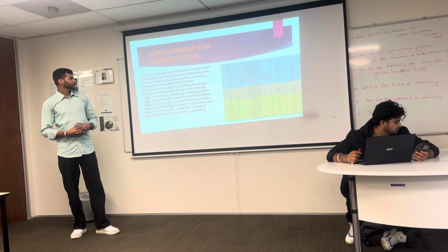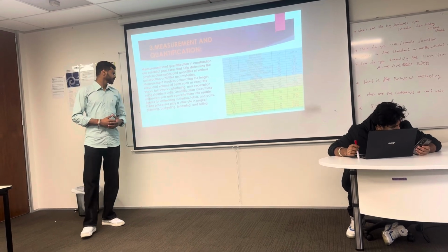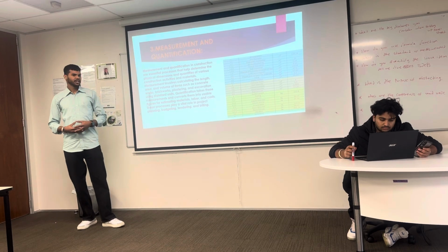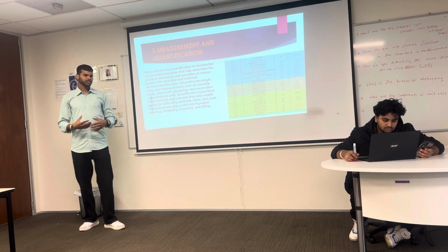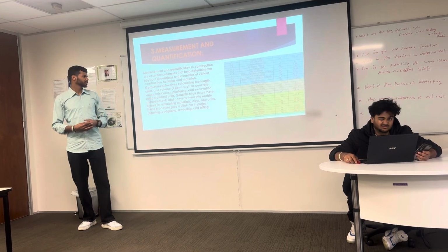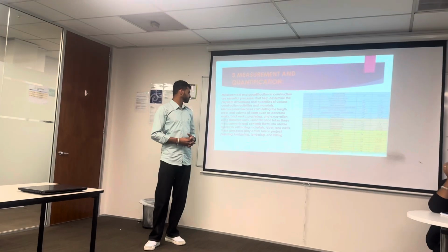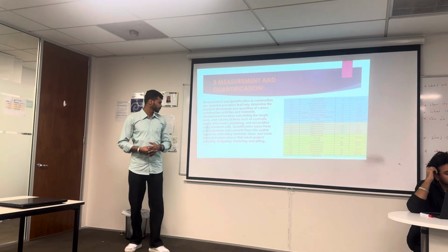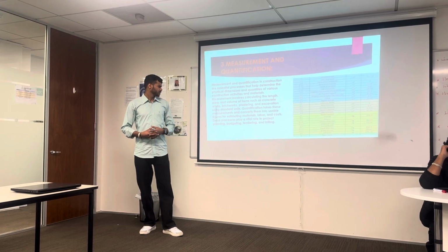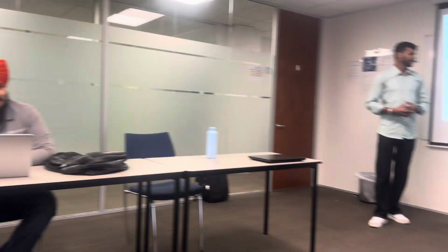So measurement involves calculating the length, area, and volume of items such as concrete works, brickworks, plastering, and excavation. This means how much concrete is to be used for a building project and how many bricks and how much plastering should be used in that project. Quantification takes these measurements and converts them into usable figures for estimating material, labor, and cost. These processes play a vital role in project planning, budgeting, tendering, and bidding.